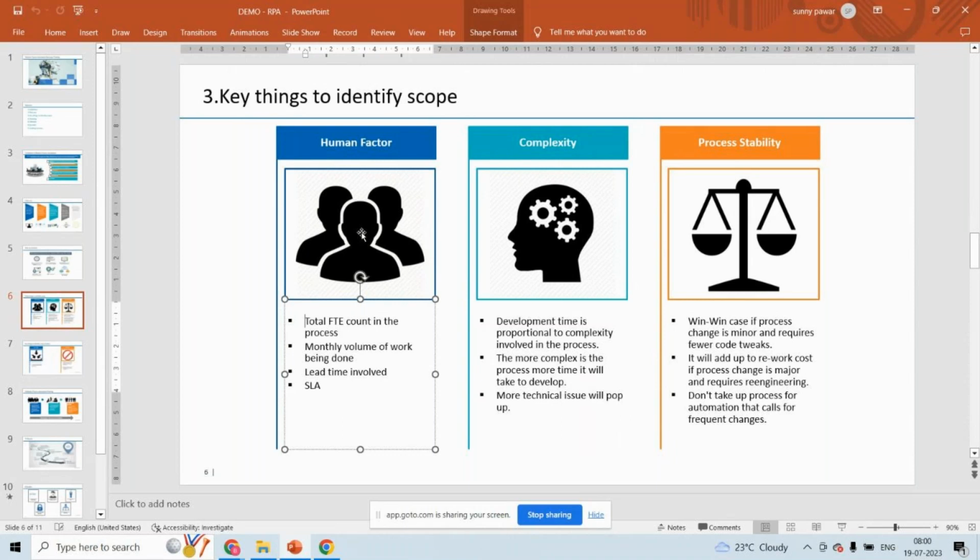If they are getting less benefits, for example, one BU is there, in the discovery phase, I was involved and identified 10 processes. After that we discuss with all the stakeholders that this process gives this much FTE benefit, this process gives this much FTE benefit, and so on. If business wants to go for those benefits, we will decide which order we need to develop. Whichever gives more benefits, we will pick up that item first for the RPA development. Did I answer your query?